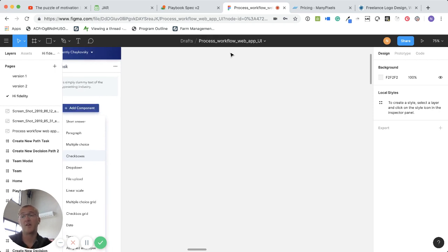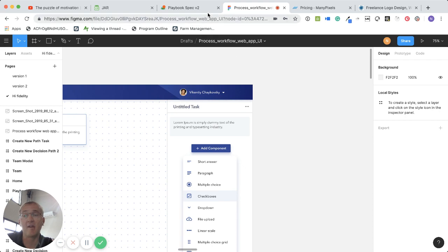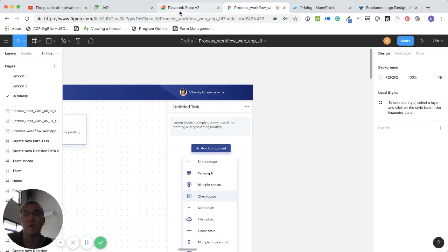And then, so we're on day 5 now, starting about day 8 or 9, I plan to hop this over to a developer to actually start building it out. So doing the Upwork design iterations and finalizing the specification for the developer are really my 2 key deliverables that I need to get finished here in the next handful of days.